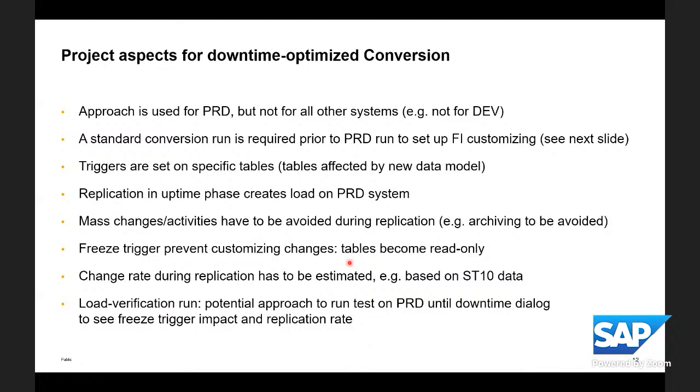And the replication is working on the end user activity. So the question is, how much is the change rate? How high is the change rate by the end user activity? If it's very high on a specific table, you have to see if the tool will be able to really replicate those changes in a reasonable time. So there's more monitoring, more preparation, more test runs. And final part, but an aspect that is widely discussed typically in a project, you should consider a